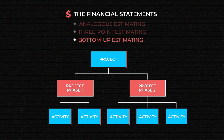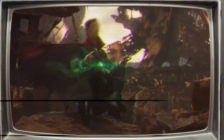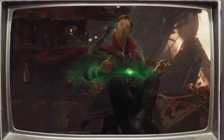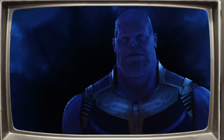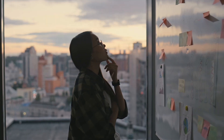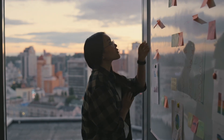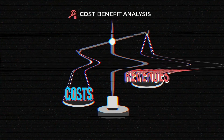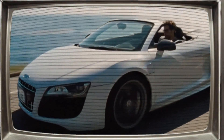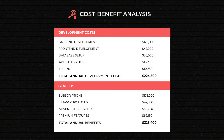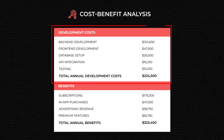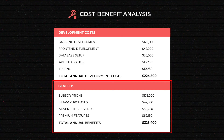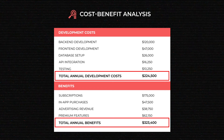Bottom-up estimating takes more time, but the results are usually more precise. Whichever technique you choose, remember that none of them is perfectly accurate. All sorts of unexpected things might happen along the way, so when estimating either time or money, leave yourself some wiggle room. The financials part is often complemented by the cost-benefit analysis, where you compare the expected costs and revenues to determine whether the project is worth the investment. The cost-benefit analysis usually looks like a table where one column lists estimated spending and another contains anticipated gains, with total values compared in the bottom line.